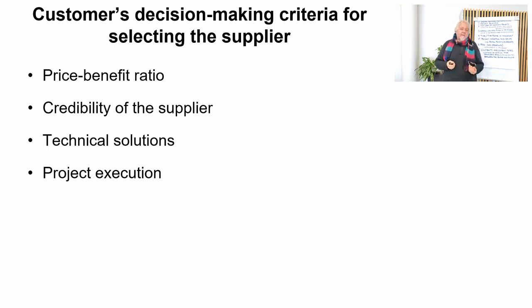Then one thing that I would like to say here, that if you are into this competitive bidding, and if the customer has sent out the request for bid for you, it's important that you really bid according to what the customer expects you to bid. So make a bid that is in accordance with the customer's requirements. But then if you have something completely different to offer to the customer, make that as an option.